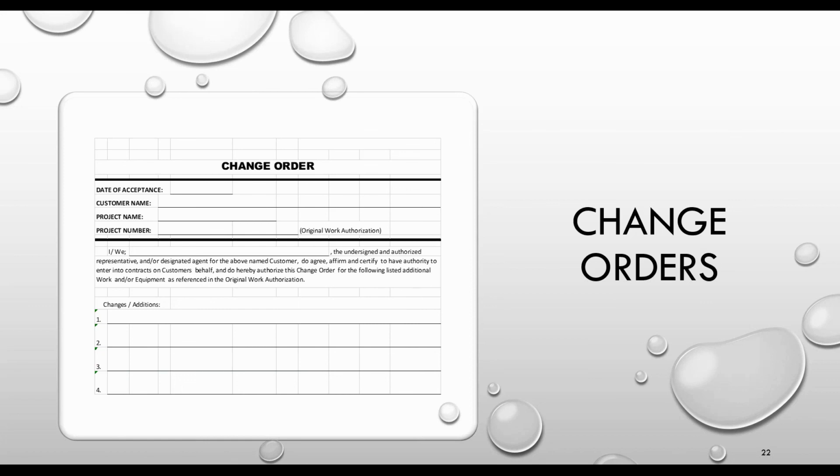So be careful with change orders. Make sure that you do them. If it's not written in your contract or in your scope of work, no one has authorized you to do that. I don't care what they say and how many meetings they say it in. If it's not authorized in your contract or in your scope of work, you need to assume that you will not get paid for it. So change orders, scope of work, your best friend when it comes to getting paid.